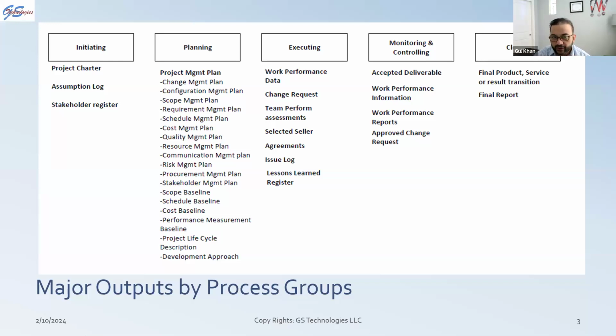However, every document you prepare, there is always a revision history header. I always recommend that you put it on top of the document. There's something called revision history. You add in that one what was the original plan, what got changed, and why it is changed. So the type of the change that you're making, when the change is being made, what is the change, and the rationale behind that change. These are the four things that are more important. And if there is one person, or more than one person, responsible for that, you will assign them there as well.